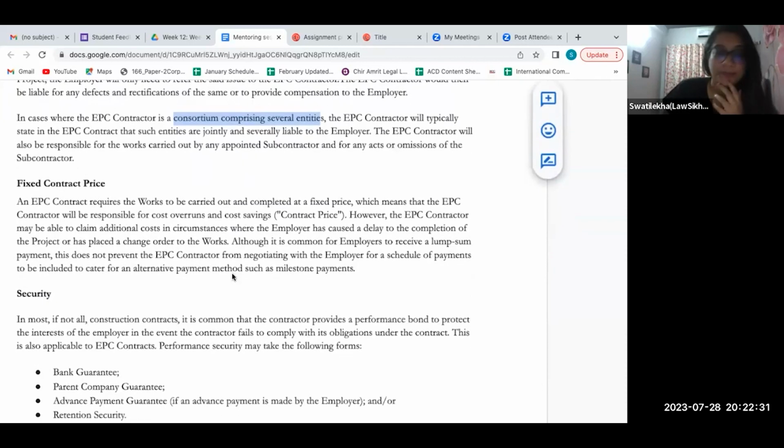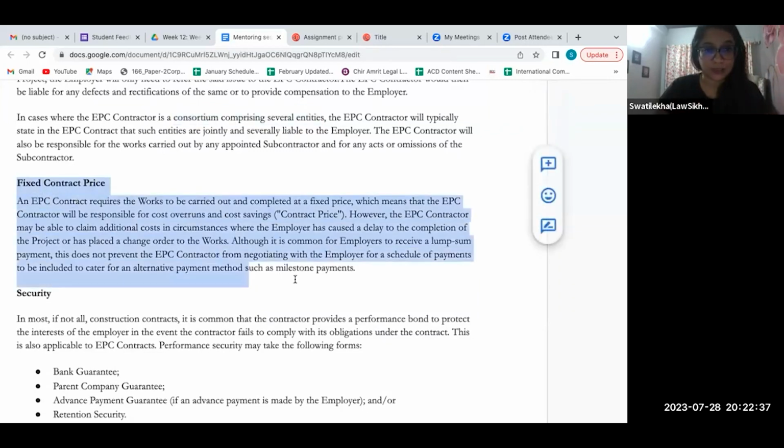I will take it. Generally, the contract price, understand this, because this point I know might be a little confusing. The lump sum contract price is fixed, but that does not stop the contractor from reimbursing itself for any incidental expenses that may occur. So incidental expenses reimbursement is not a part of the contract price, right?